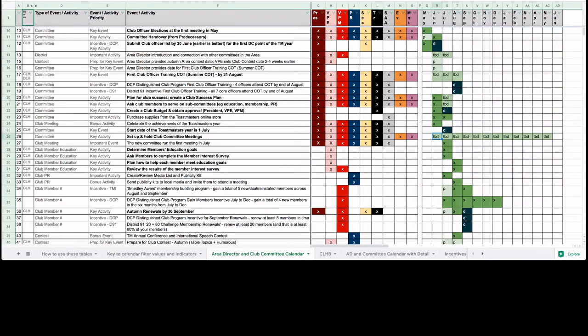There are these conditional formatting rules set up on the spreadsheet. Don't worry about it if you're not familiar with that. You can just use what's there if you decide to use this. P for planning, TBD for a time period where it still needs to be found out or decided when exactly something takes place. X, where we're pretty confident that something will take place in a particular month. And D, well, we already know that there's a deadline associated with the activity or event.